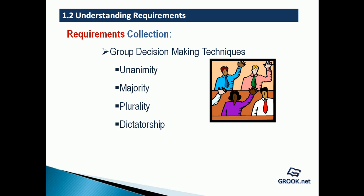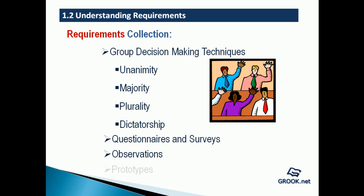Other techniques include questionnaires and surveys, observations — to see how processes are carried out or how people work — and prototypes, which involve making a working model before making the original so that feedback and evaluation can be received on a sample before making the full version.